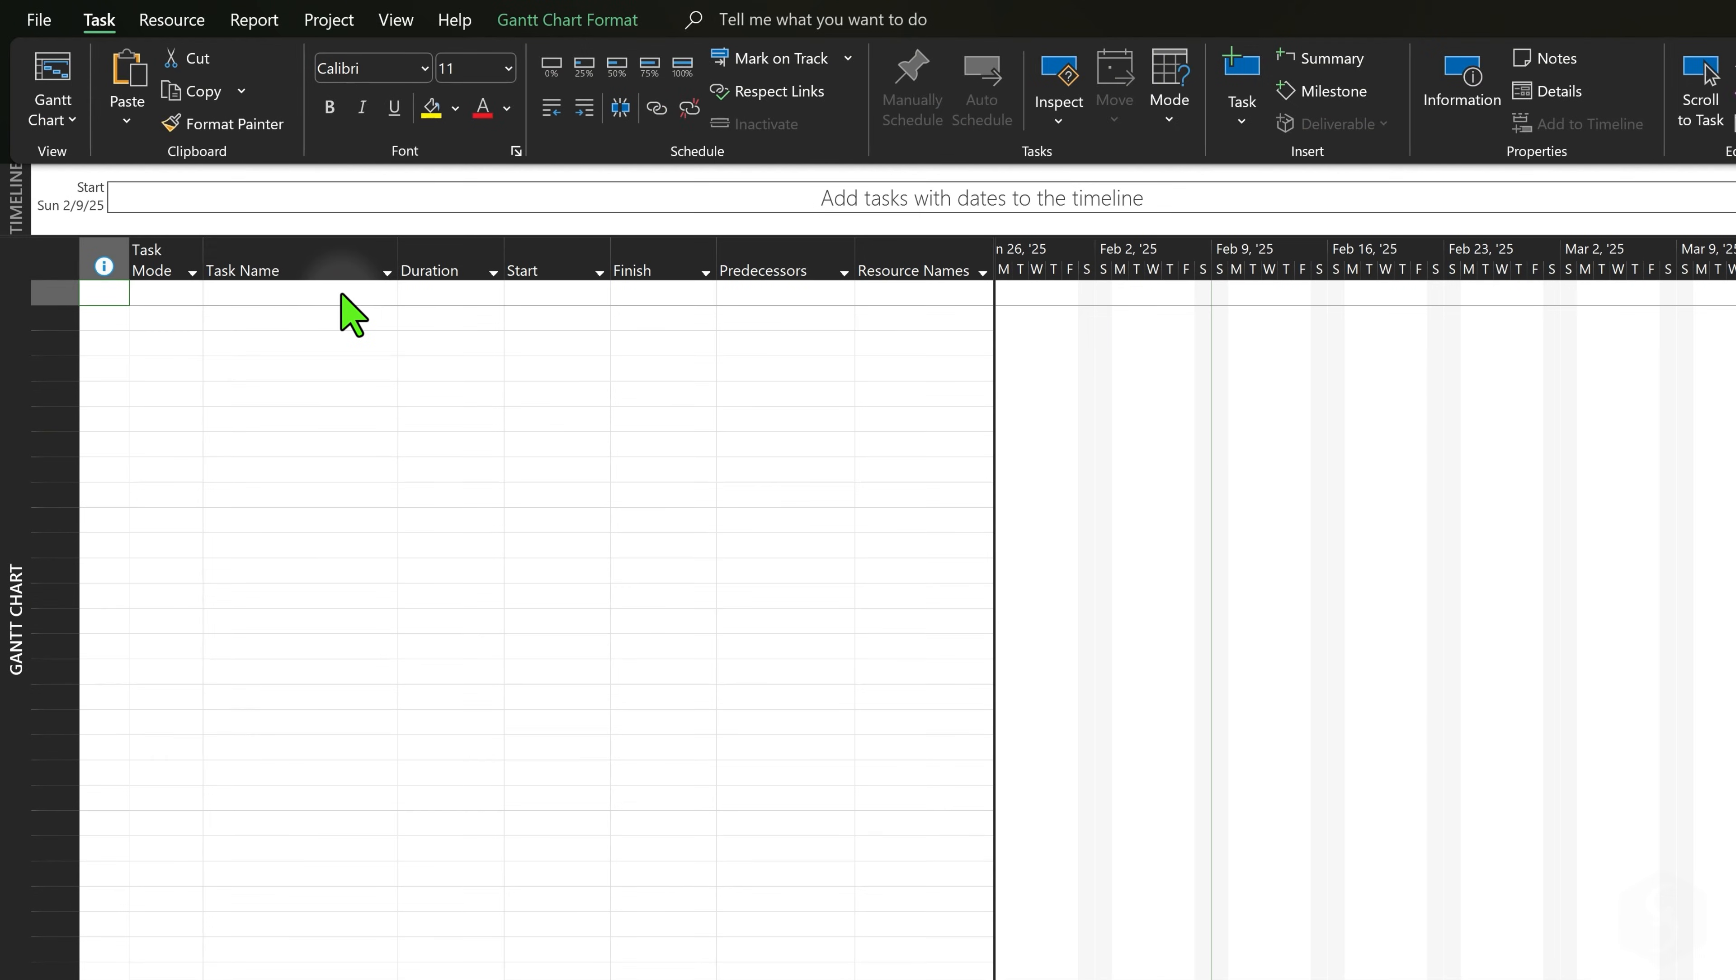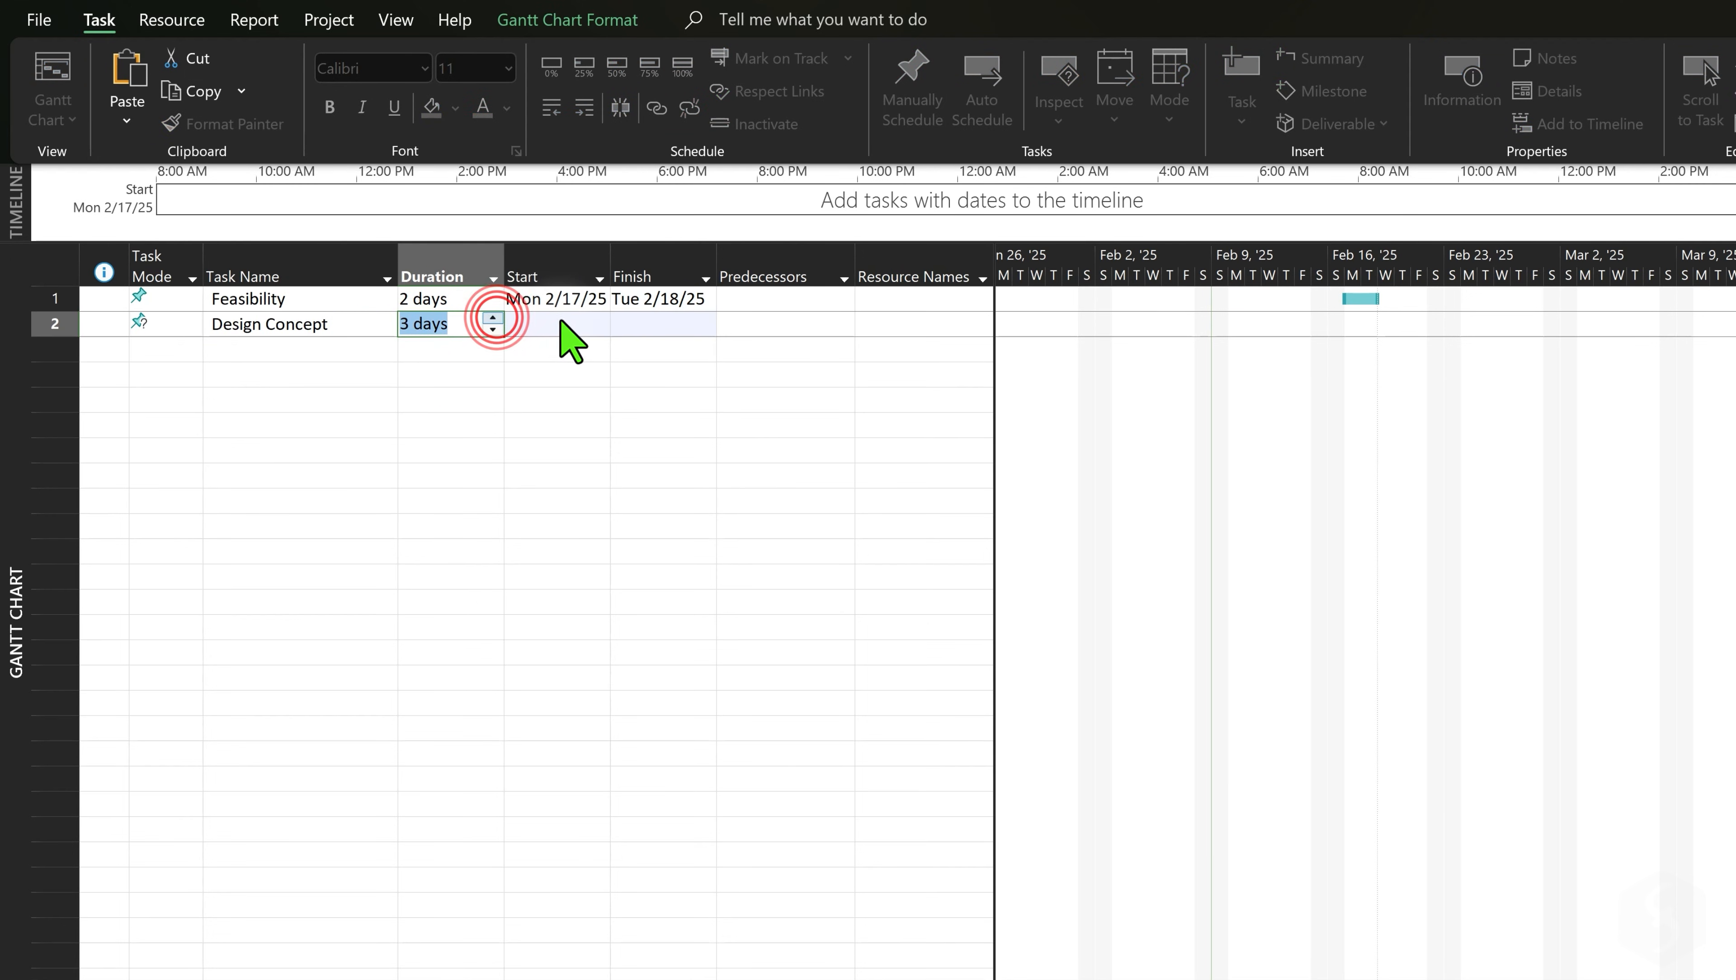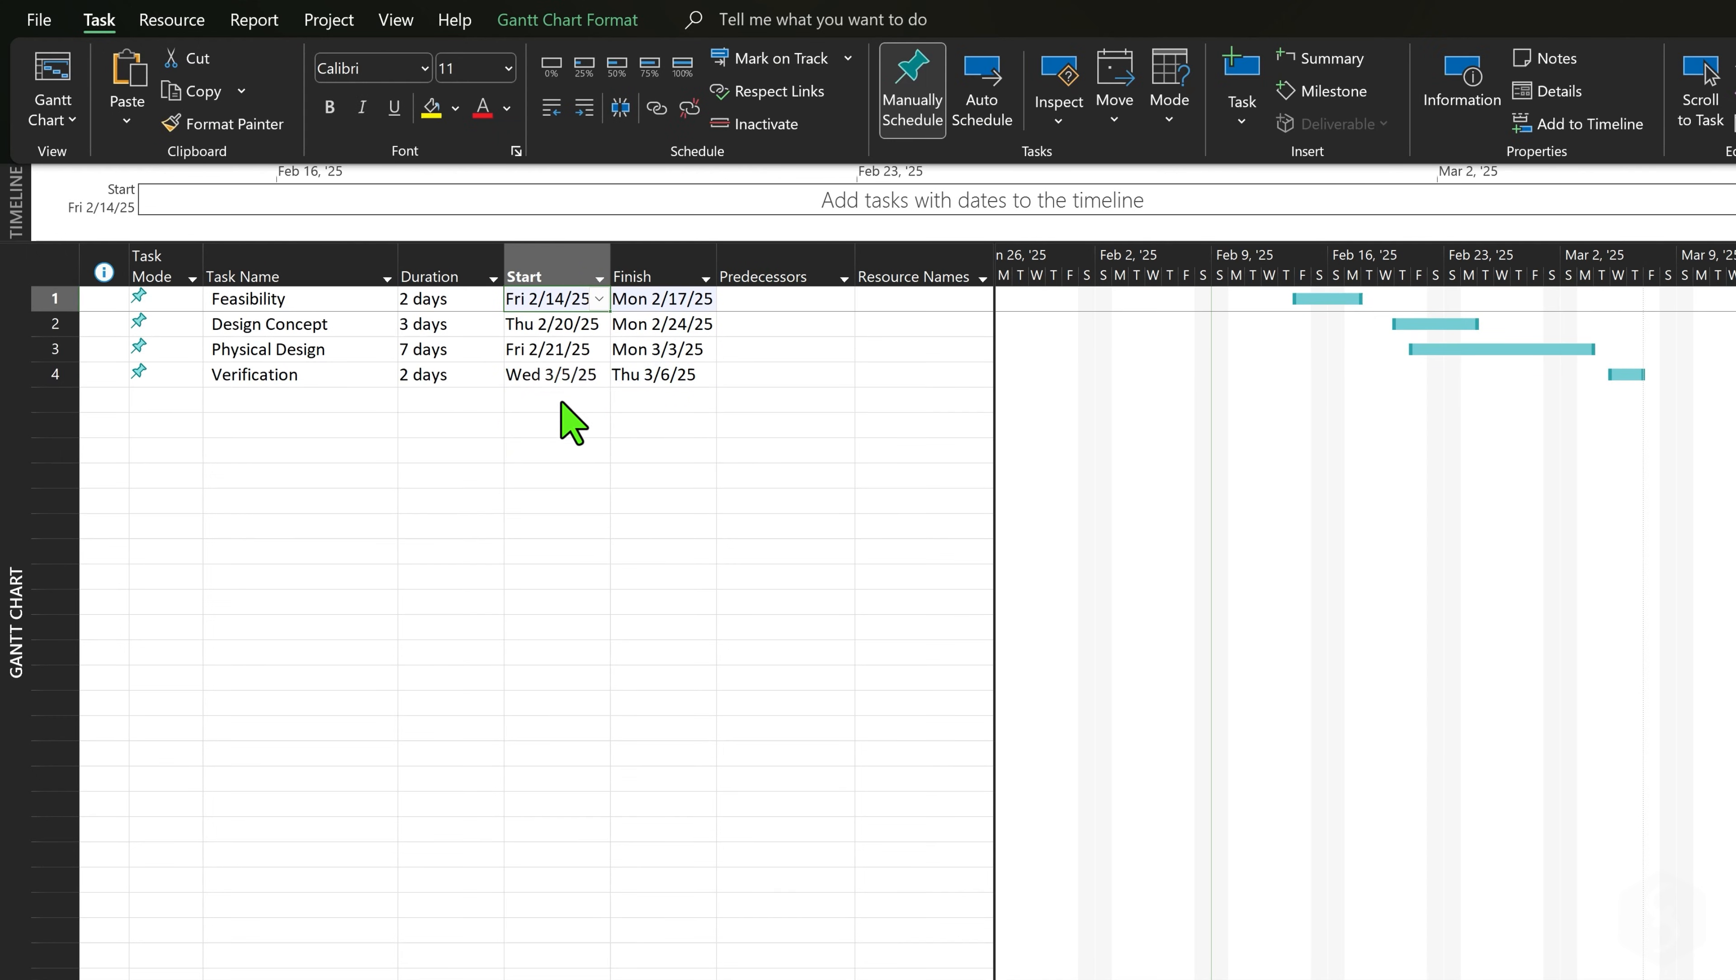To define tasks type any name in the task sheet and provide two details between its duration, start date or finish date. Each task is shown as a bar on the Gantt chart, which updates automatically based on the data entered on the left.